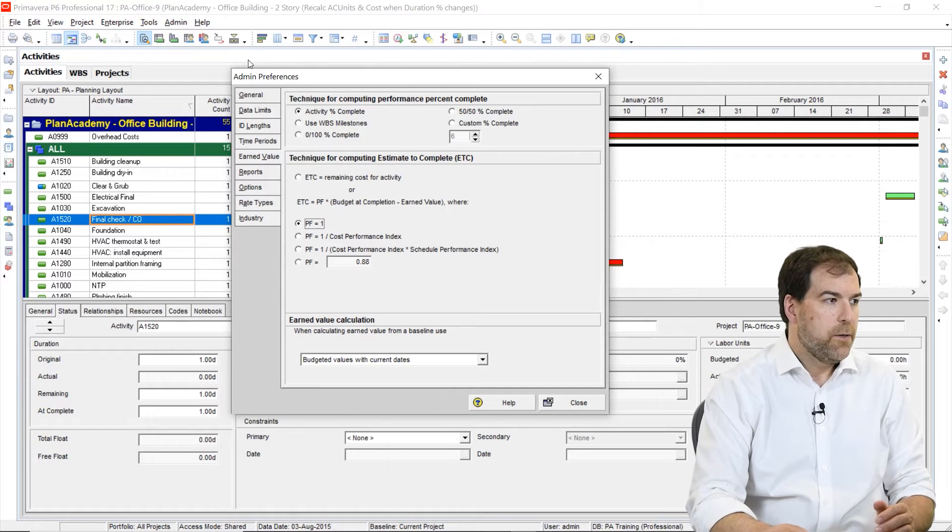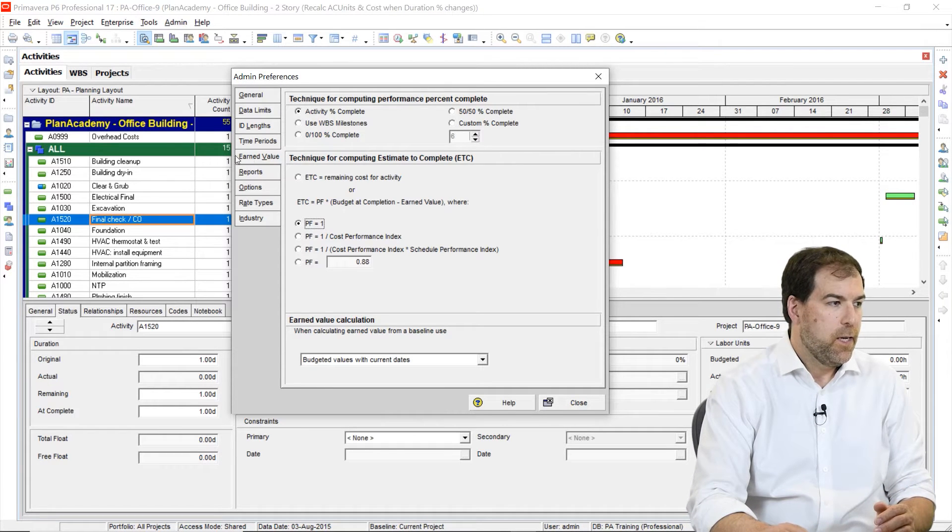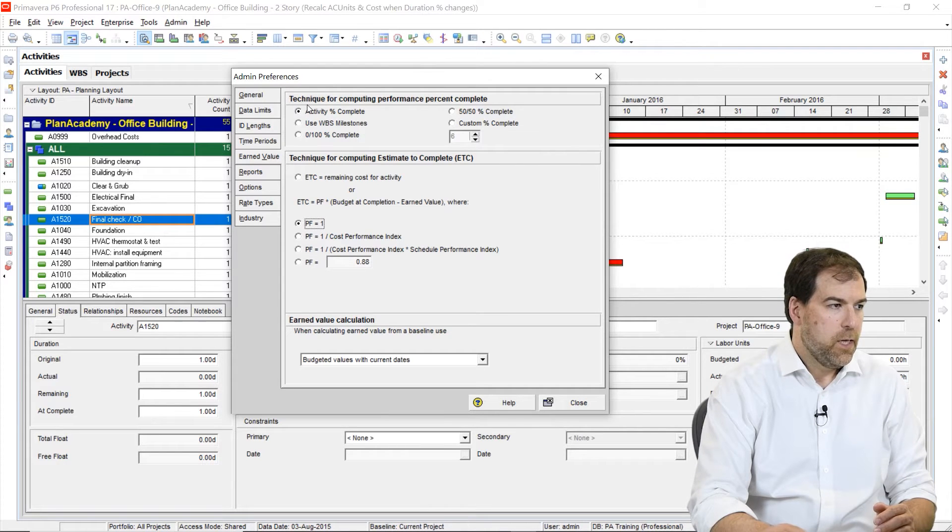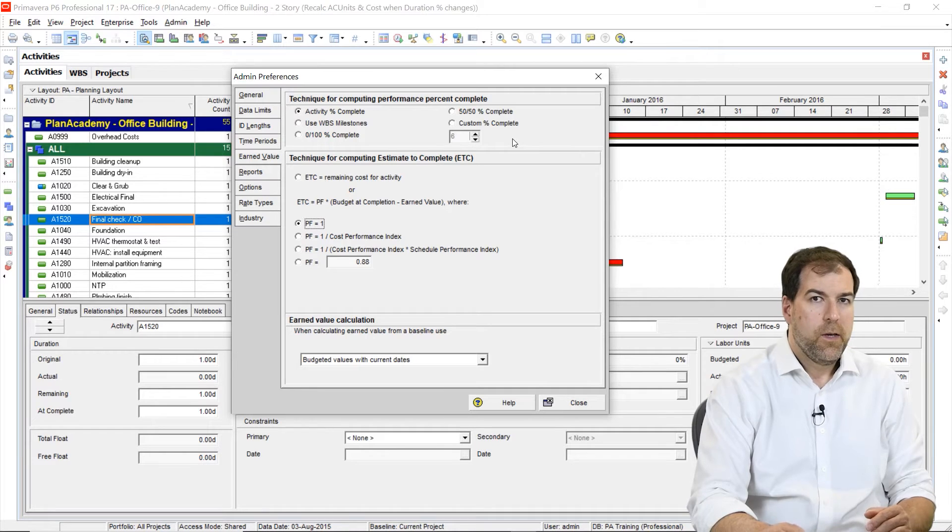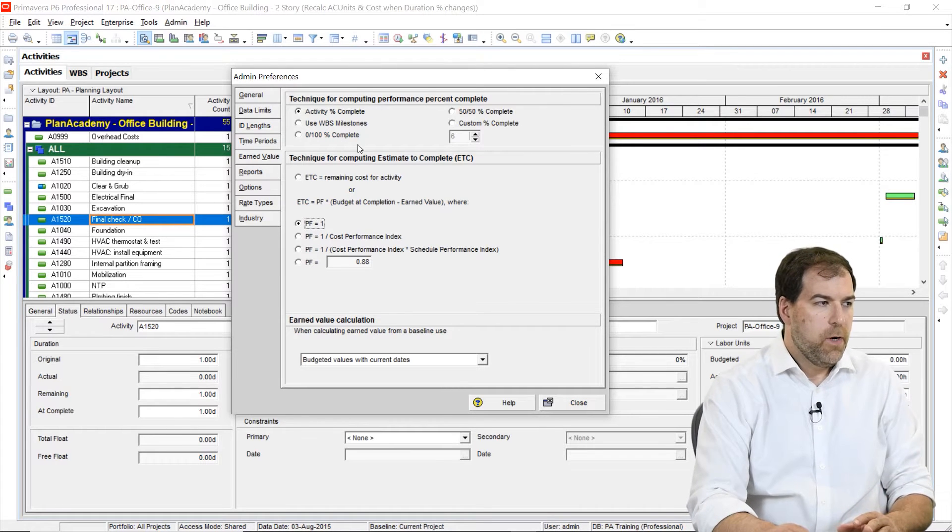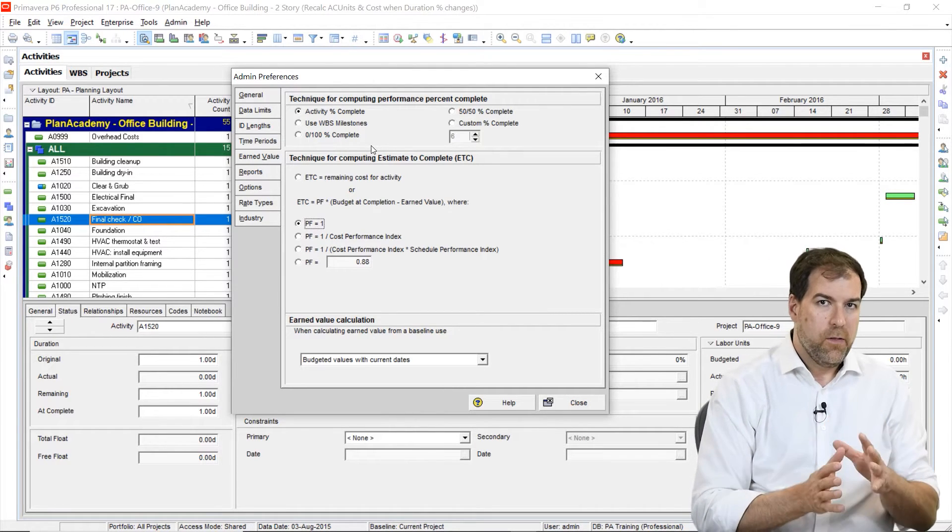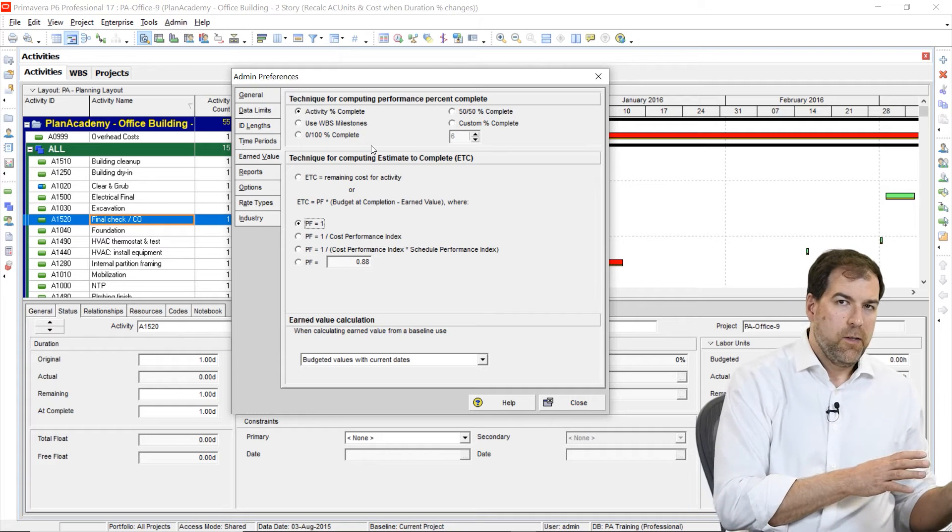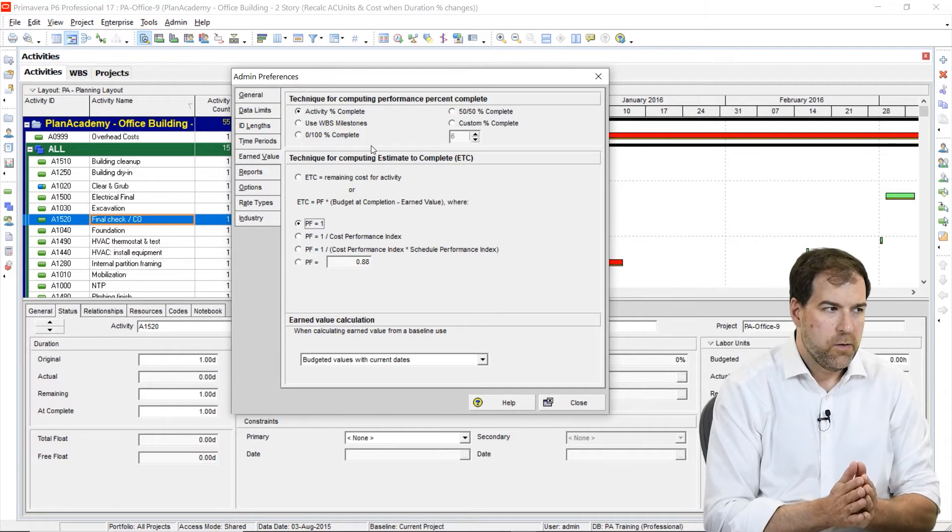I'm in the admin area under admin preferences. Again, I'm on this earned value tab. Here's the setting we're talking about up here: technique for computing performance percent complete. I want to remind you that some of these settings like this one can also be found in the WBS area. I'll show you that in just a minute.